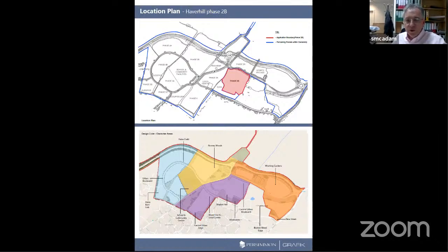so that that relief road is delivered. And to get over the first hurdle there, we're hoping that the tree conditions that are applied to the road's planning permission can be dealt with as soon as possible, because we want to do that within the nesting season. Our hope is to get that done within the next few weeks, because if we don't, that's going to set us back 6 months on the delivery of that relief road, which is not what we want. And these conditions are in with the council at present to discharge.